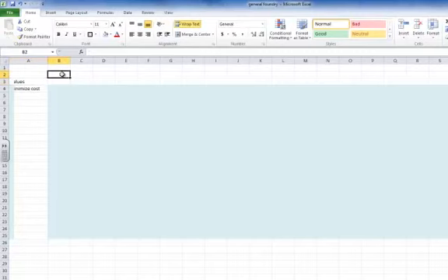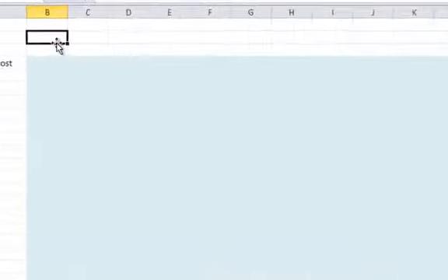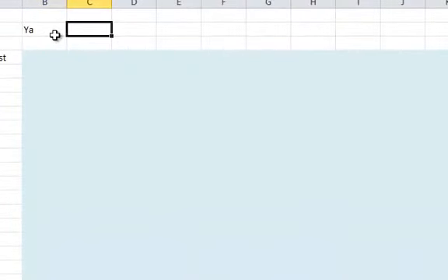So we're going to fill in our formulas, and along the top we're going to put in a variable for each of our y's. So we have ya through yh. Remember that y reflects the number of weeks that each activity has crashed.